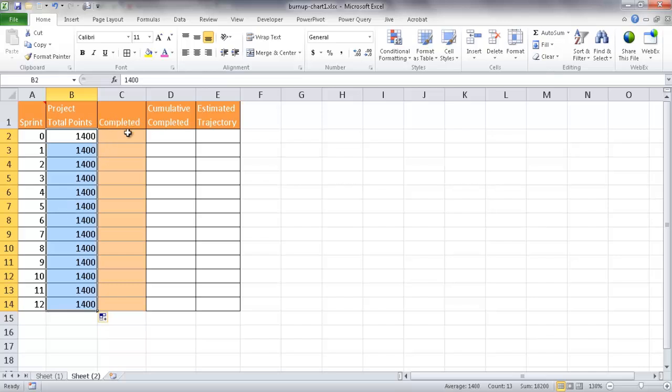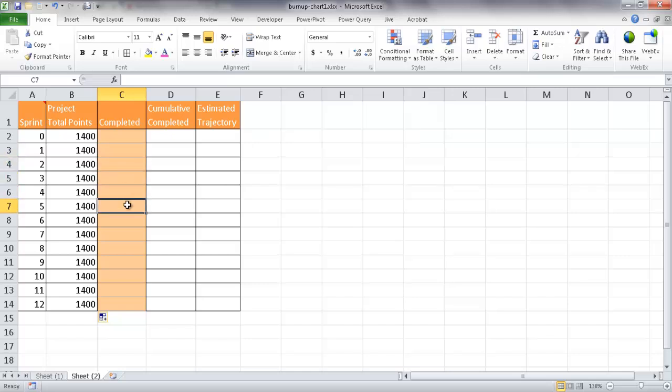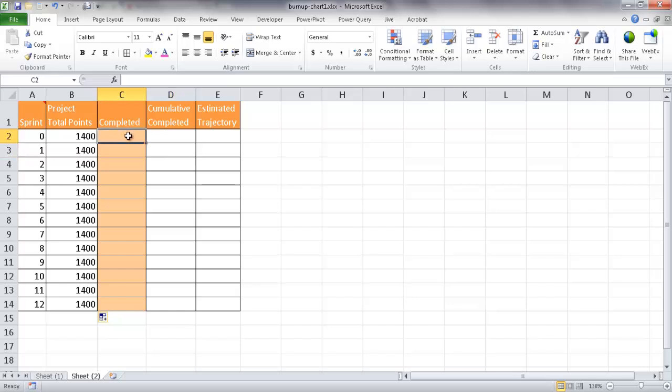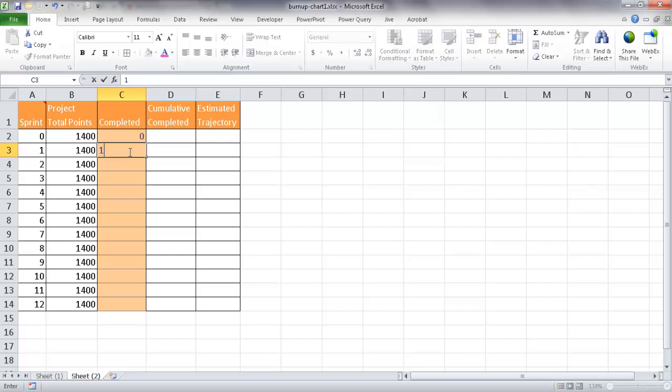So this 1,400 points can basically go along the whole line or the whole span of that project. So that's going to be our initial blue line that we saw in the previous chart. Now this completed is what we would fill in after each month. We would say how much it was completed. And this cumulative completed would tell us the total as it adds up per month. So let's say for example, the first month is going to be nothing. Or when we start, it's going to be nothing. The first month, by the end of the first month, maybe we have completed 120 hours of, or 120 units or points of work.